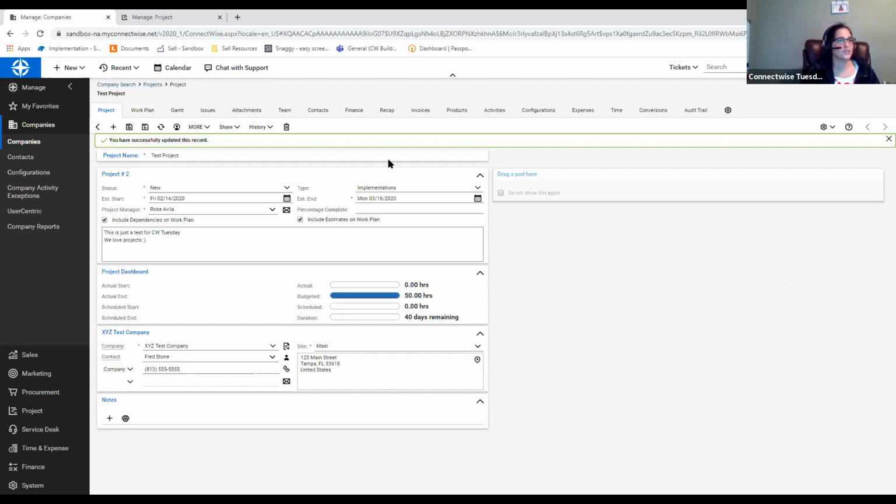Okay, so this is what the face of our project looked like. And that 50 hours, because I said use as budget, will show here. So on a project dashboard, right out the gate, some of the things that you get as you start working your project is the ability to see how many hours you've put against the project from an actual percentage, how many of those were budgeted, so you can watch that meter fill and gauge where you're at. And then how many of those hours that you actually put in there were scheduled, okay? This says I have 40 days left remaining in my project, okay?